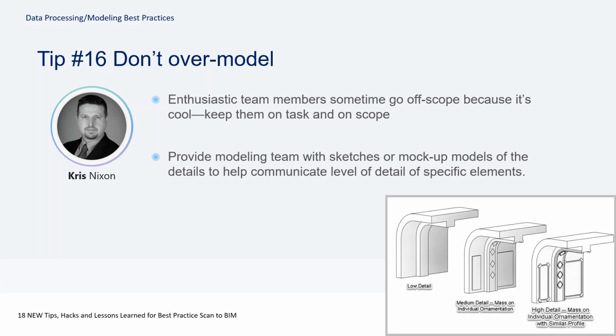Not just watching out for models that are under scope, but my suggestion is to watch for models that you've produced more than was in the agreed scope, because you can very quickly find yourself arguing over things like not being able to see all the handrails, and handrails weren't even actually in the scope to produce.